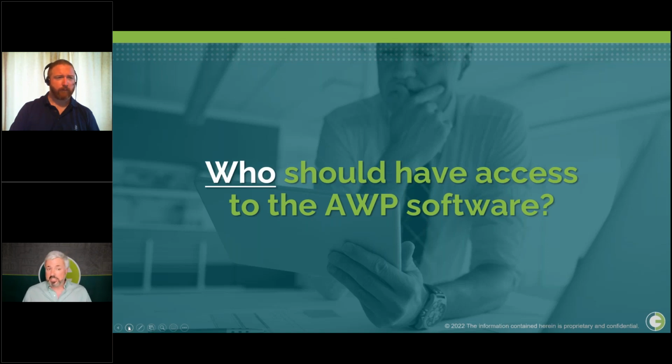So when it comes to access to the technology, engineering needs access. They can manage their scope, manage their vendors, report progress, respond to RFIs, execute constraints, develop engineering work packages. Construction can break the work down into these executable pieces, installation work packages. They can manage those packages through their life cycle, carry out the work, report the progress of those packages, manage all the constraints, and prepare it for turnover. And the owners can see exactly what's going on with the project and make informed decisions in the best interest of the project based on this real-time data. So everyone on the project team across all the organizations can play a role, including the scaffolders, the engineers, the vendors, the material handling team, contractors, engineers.